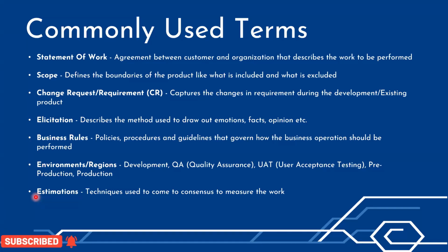Client will not give you an exact estimate, but client will share the expectations that I want the work to be finished in 1 month. As a BA, I need to assess whether the requirements, whether the business rules, how much time will I be taking, how much time developer will take, how much time tester will take. So based on that, whether it can be finished in 1 month or not.